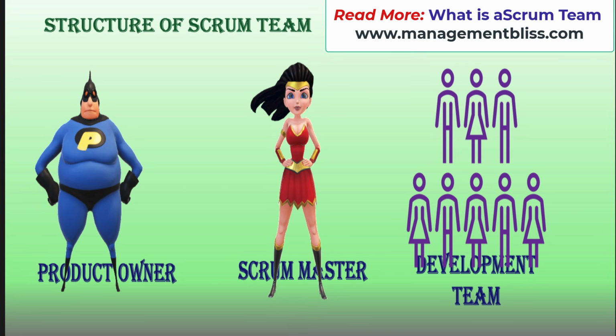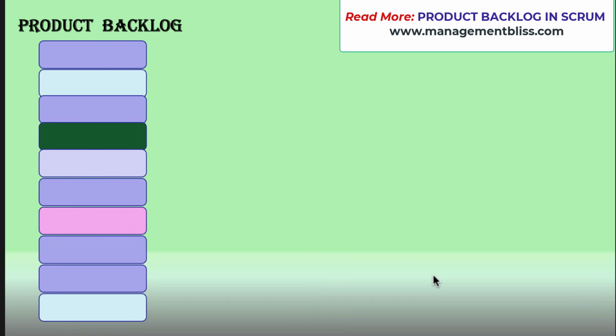Let us now discuss backlogs. Product backlog. Product backlog is a prioritized list of user stories. Product owner manages this backlog. Only product owner can remove any work items from the backlog, though anyone in the team can go ahead and add additional items to it. Scrum team discusses work items of the product backlog to estimate, specify, and prioritize them. This exercise is called as backlog grooming.